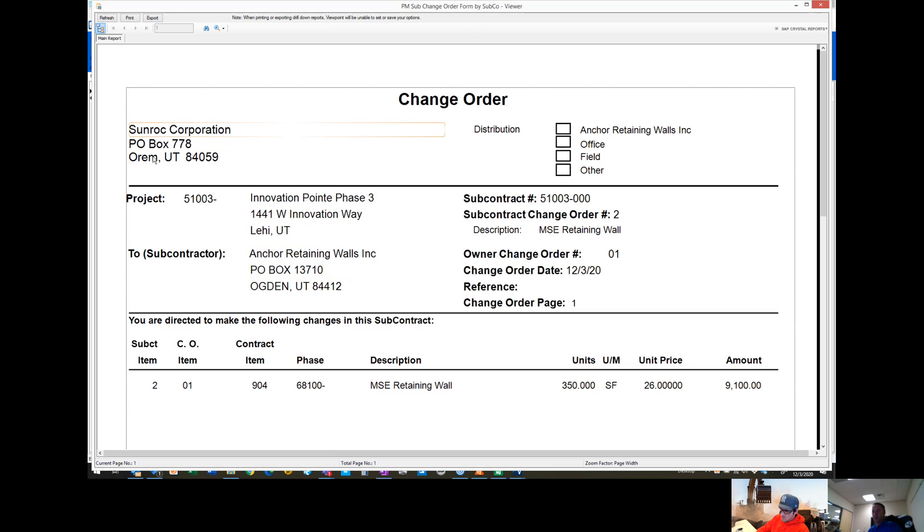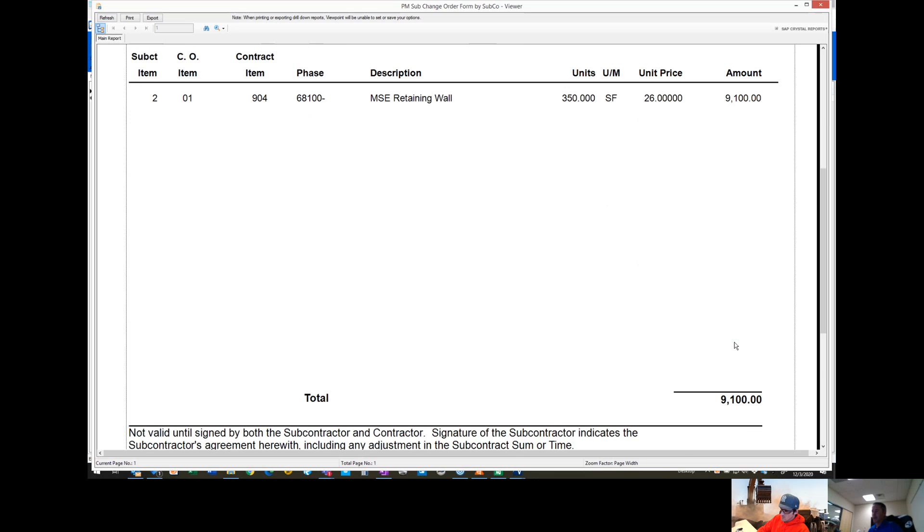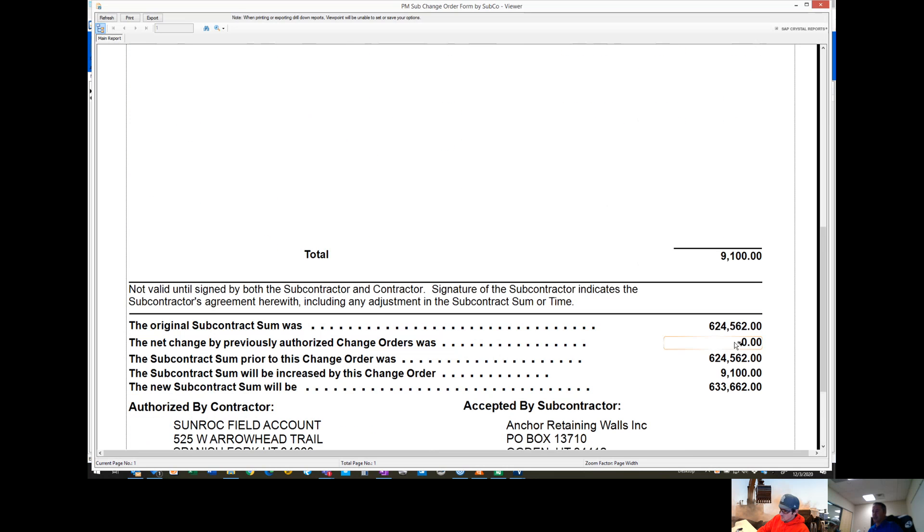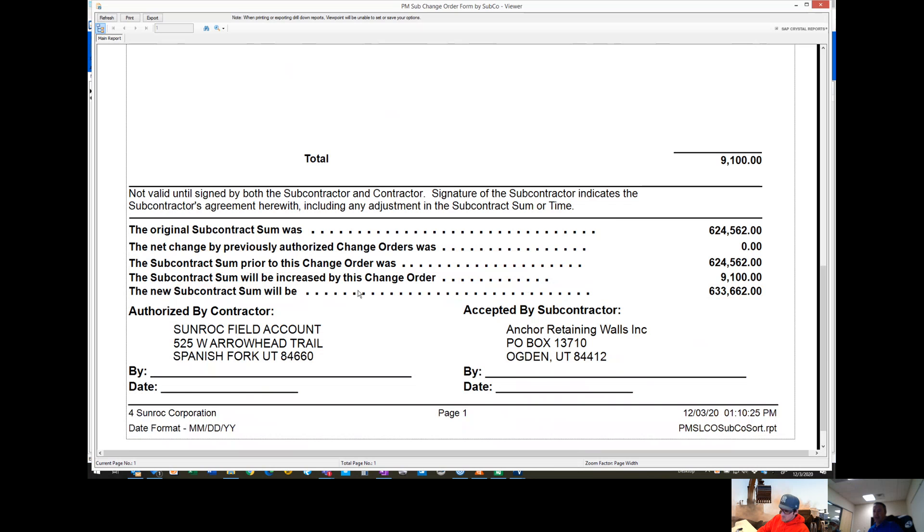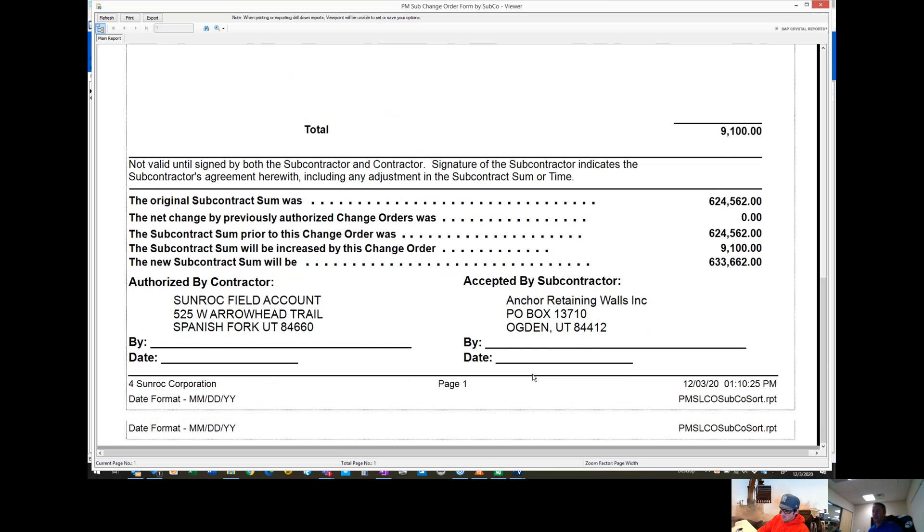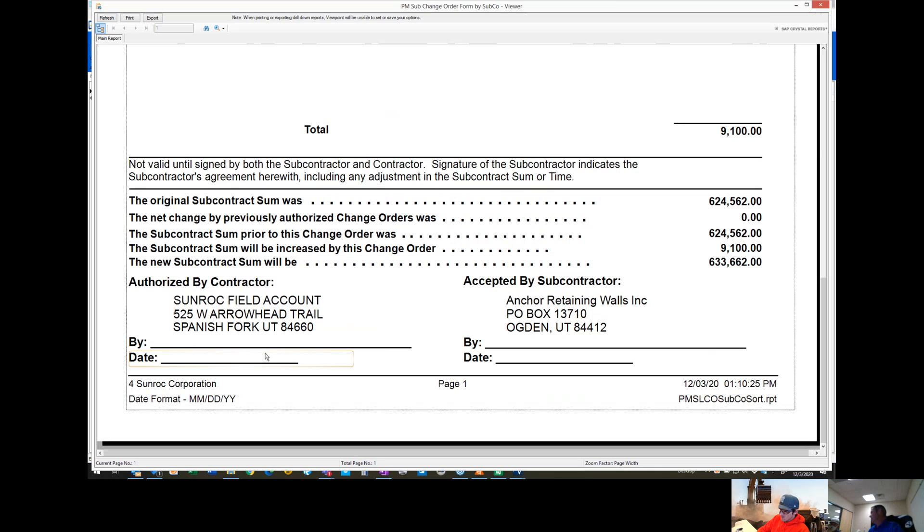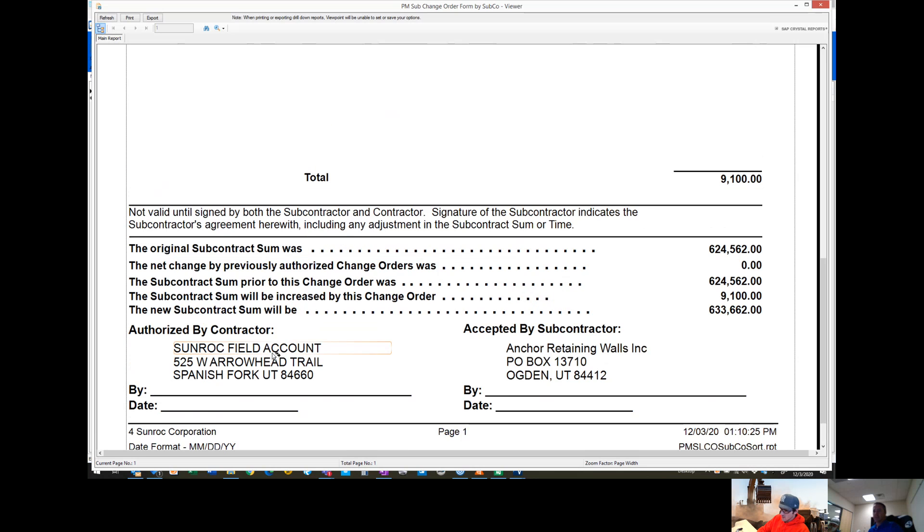It comes up with this change order on Innovation Point to anchor walls. It comes up with their 350 feet, the amount, and down here at the bottom, original contract, change order amount, new contract sum. So we can sign this, we can shoot it off to them to get a signature. Usually you have them sign it first, they send it back and we sign it, date it, and send them a negative copy. That's typically how you see it with the general contractor.